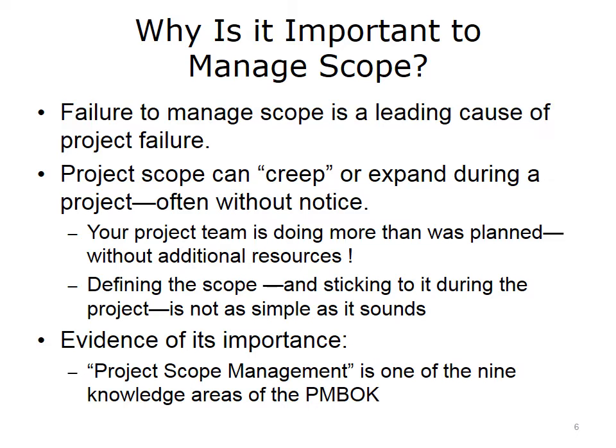It can be tempting to just go along with customers who want changes on the project. The smart thing for you to do is to define a process at the beginning of the project for dealing with change requests. You may want to look at your organization and see if such a process already exists. You can still be a team player, dedicated to the success of the project, and also be firm and help educate your customers as needed so they understand that it's foolish for all parties, including customers, if you uncritically accept all kinds of requests for changes in scope.